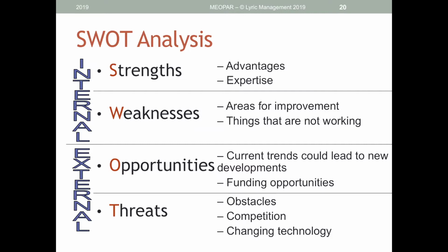Another approach that you can take is known as a SWOT analysis, and this is a little bit more detailed, but I find it's even more effective for project teams to identify not just risks, which would be the opportunities and threats, but maybe some things inherent in the way the project is set up or designed that can represent strengths and weaknesses that could then potentially offset some of those external risks, the opportunities and threats. In a SWOT analysis, you usually have a leader or a facilitator, so someone from outside of the project team, to facilitate a dialogue with the project team members around where they see the strengths and weaknesses and the opportunities and threats to the success of their project.